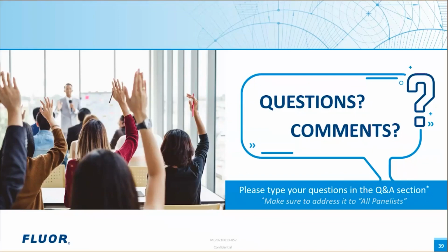That's excellent, Yark. I wanted to add one thing to that. Also, it can increase your ability to get the project coordinated. The sooner you can start incorporating your detailed LOD 400 content and your specific items for the project and get them incorporated into the BIM environment, the faster that you can get things coordinated and out for fabrication and installation. That's a great point.